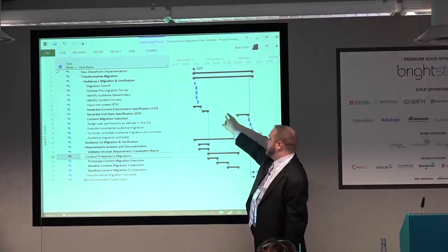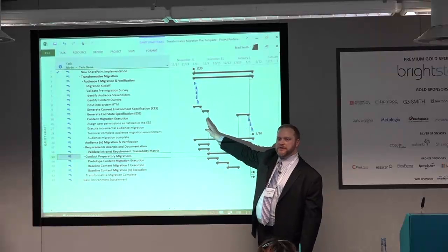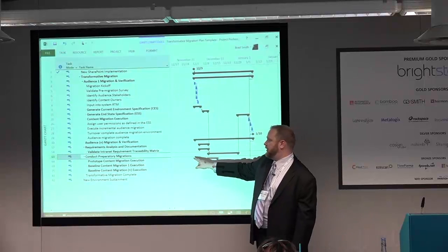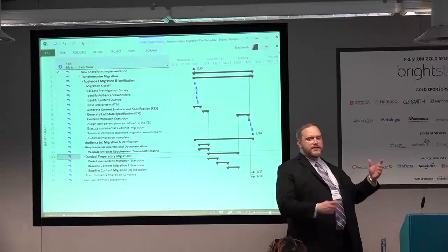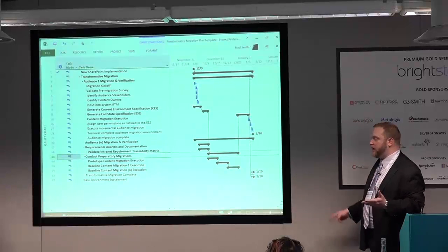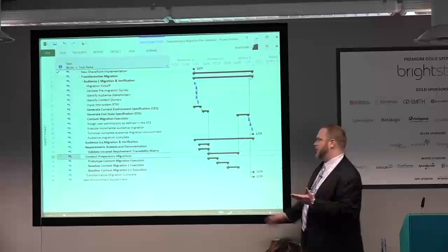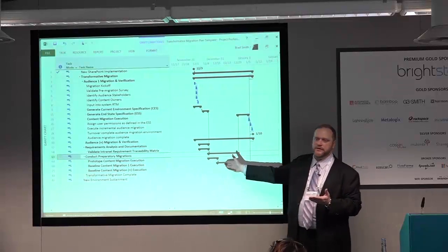But then audience-specific work stops. And what happens? We do the things for everything. We conduct the preparatory migration. The prototype is for everybody. Once we have all the CESs and ESSs in, we do the prototype for the whole organization.